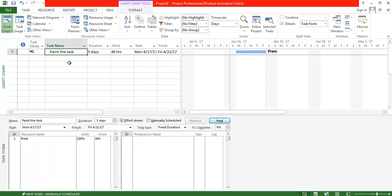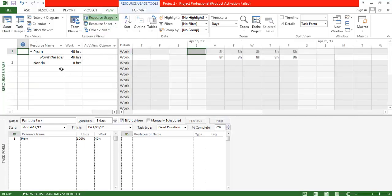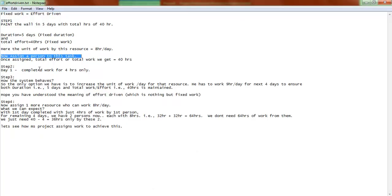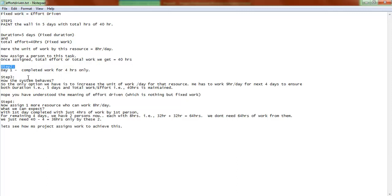Now, to understand effort-driven behavior, we look at how those 40 hours are assigned. Viewing the Resource Usage screen, you can see the hours split as eight hours each day across five days. Now for Step 2: let's assume that on Day 1, the assigned person was only able to complete four hours of work instead of eight.